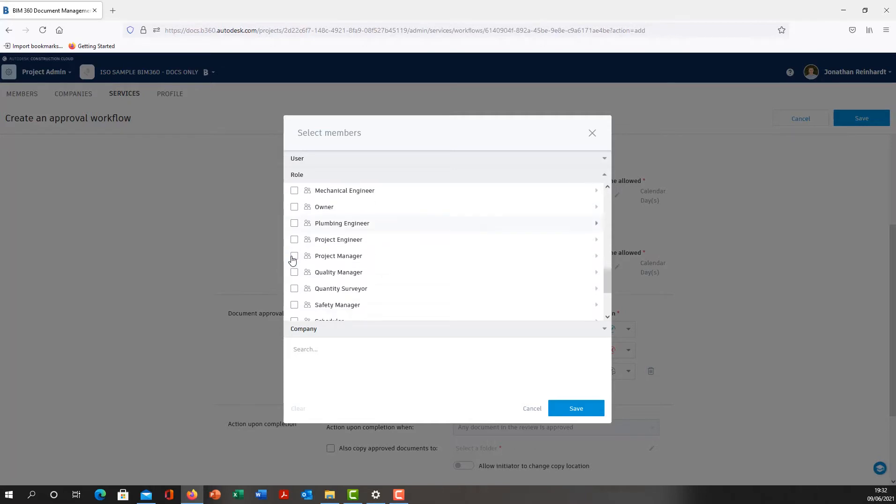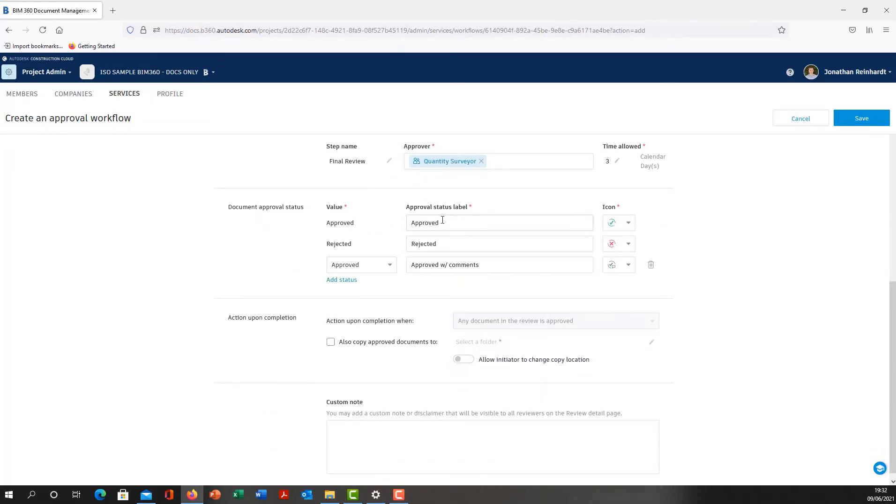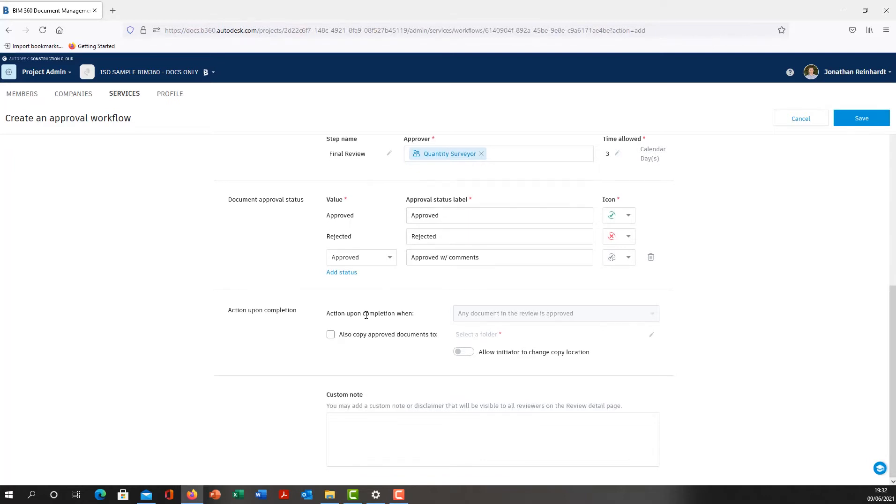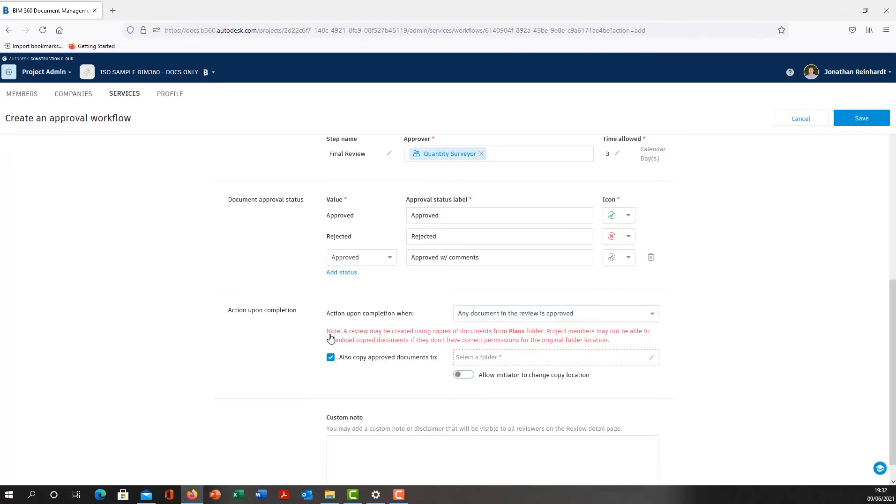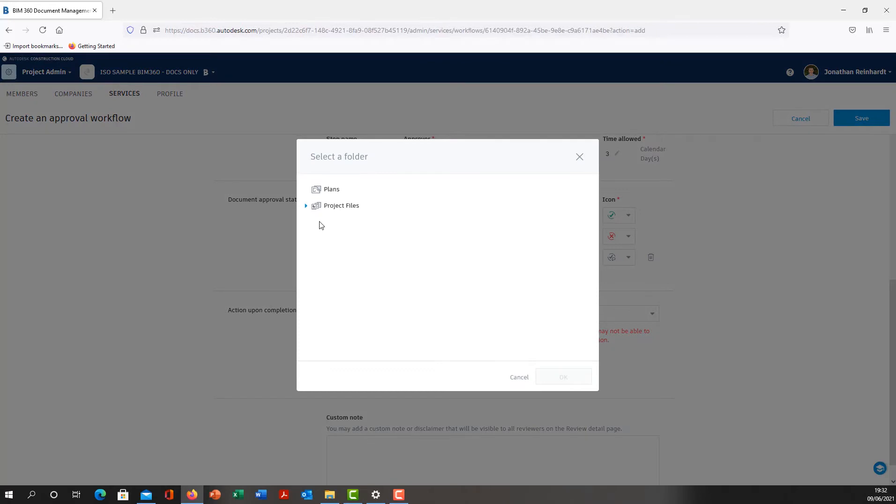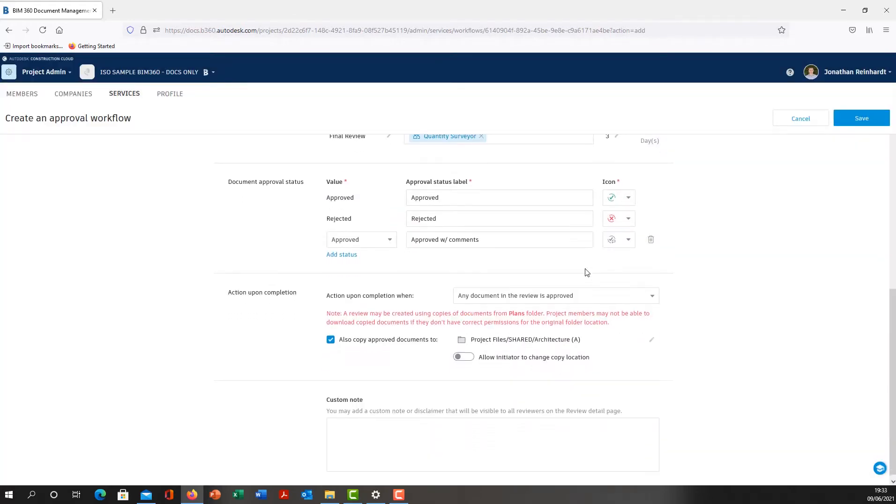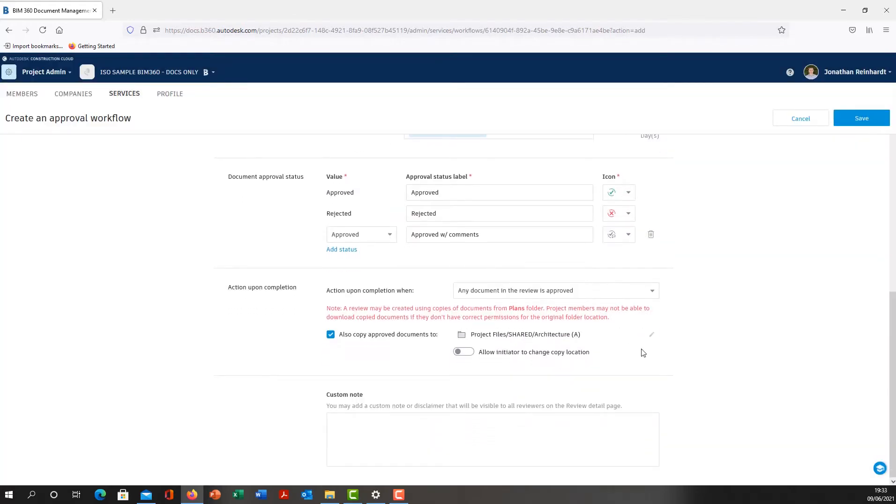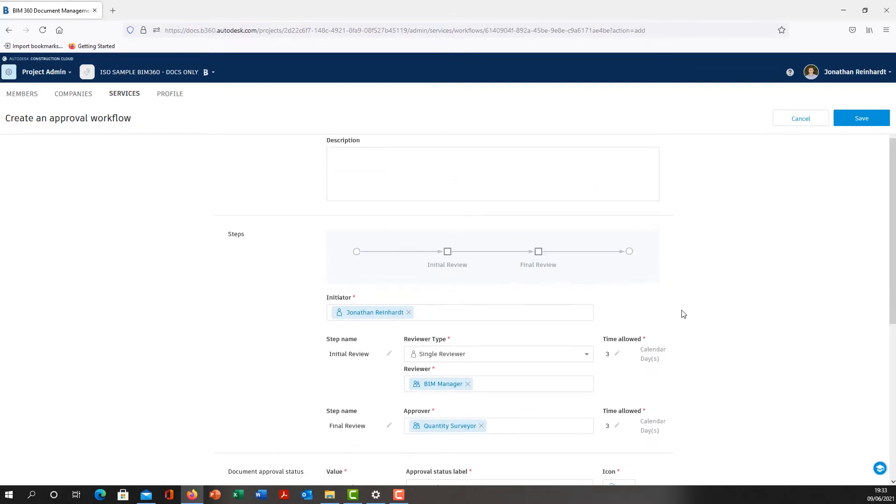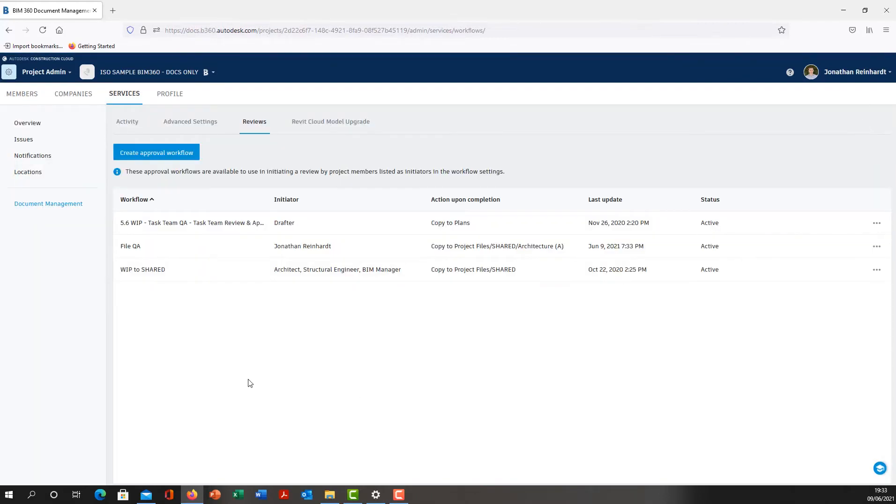So we look for Quantity Surveyor. The Quantity Surveyor then needs to approve the change that it's going through. If you want to change any of these items, I'll just leave them as are: approved, rejected, approved with comments. Action upon completion: also copy approved documents. You don't have to select this, but it's better practice, particularly if you're working on an ISO 19650 type project. Select the folder, so once this particular file is approved, I want that to go into the shared folder. Click OK, click Save on that.